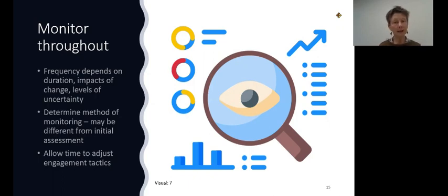How clear is it on what I'm doing? So those levels of uncertainty, there's another grid that you can use where we would talk about the levels of uncertainty. So the Stacey complexity model. And we would look at, does leadership have vision, and do I have certainty over the process or the tools? If I don't know something, that's a red flag for me in terms of change management. I want to reduce the uncertainty so that I'm able to move forward.